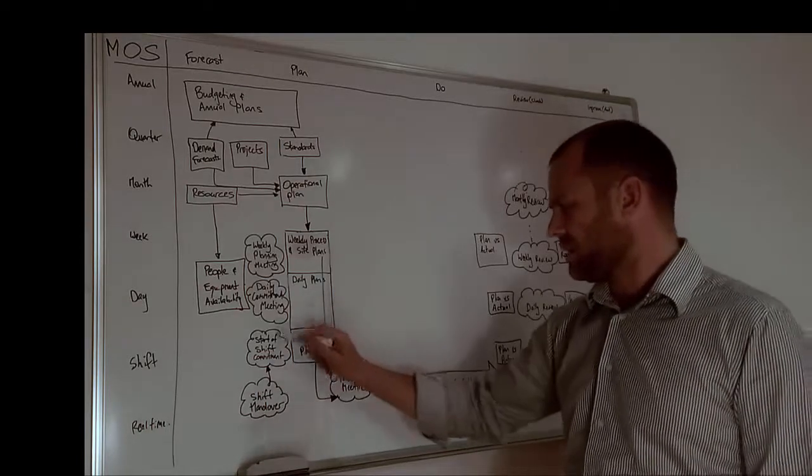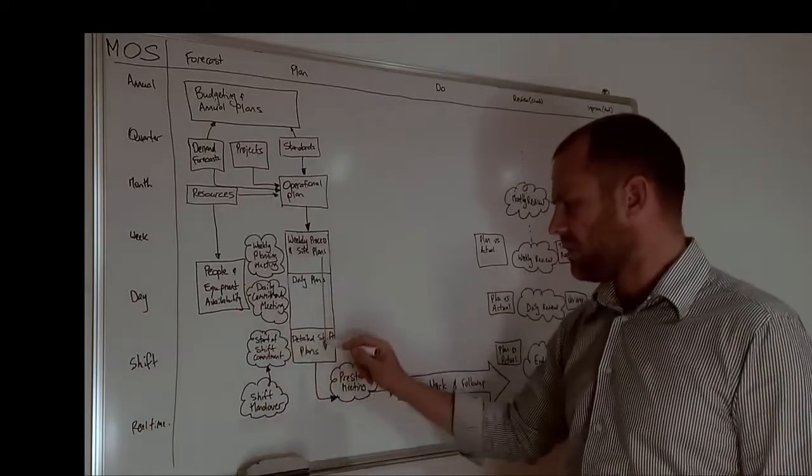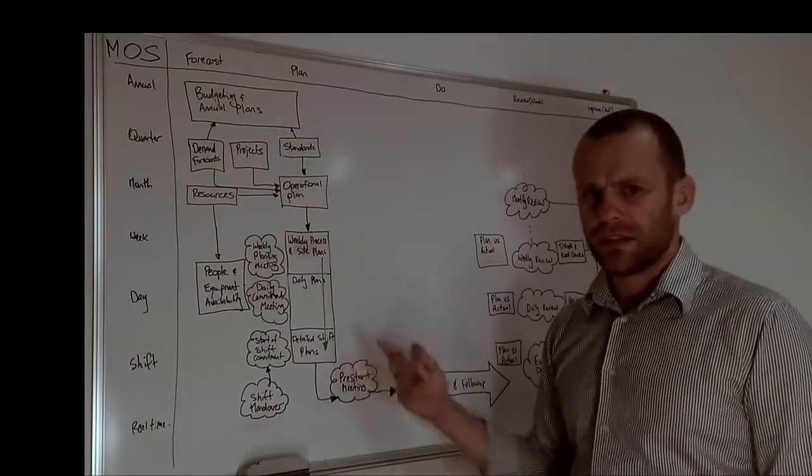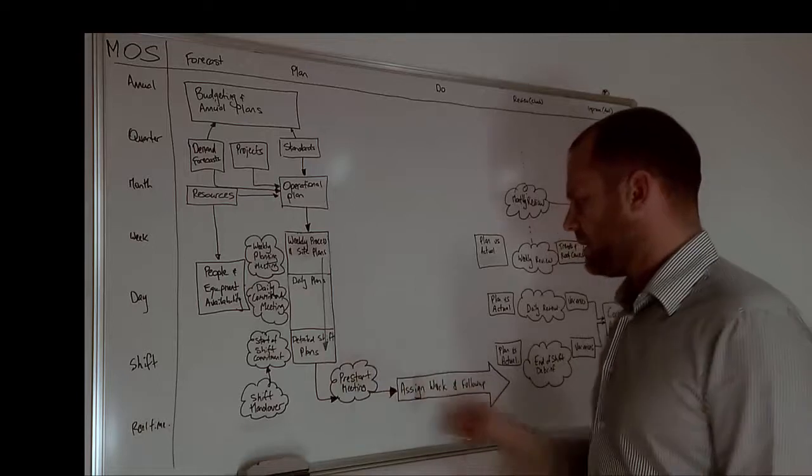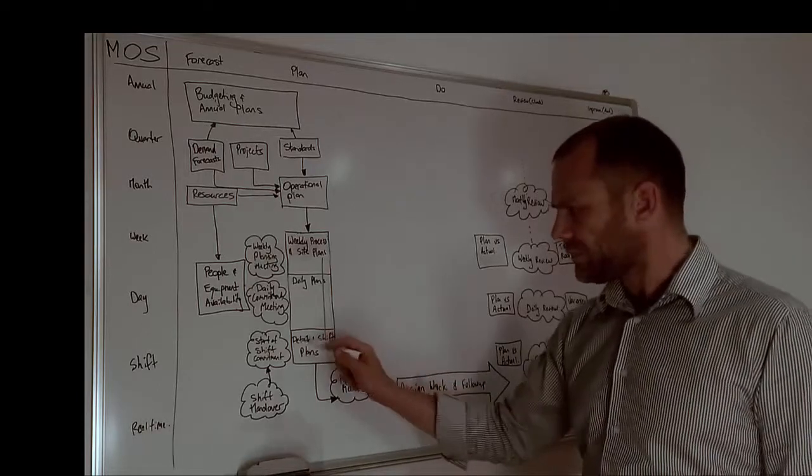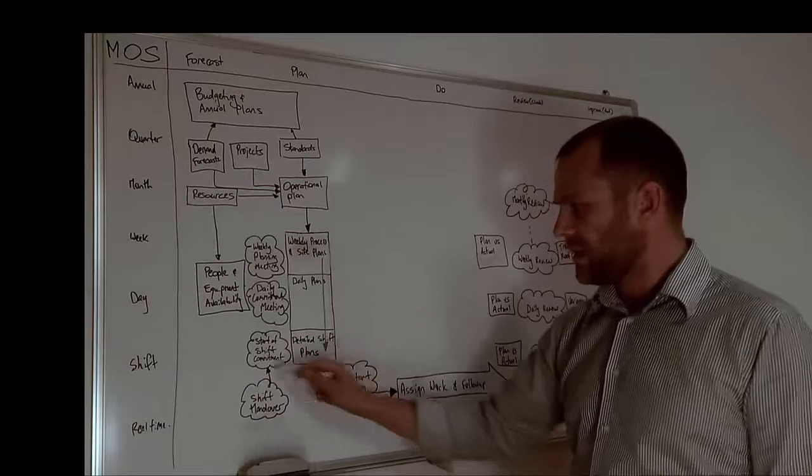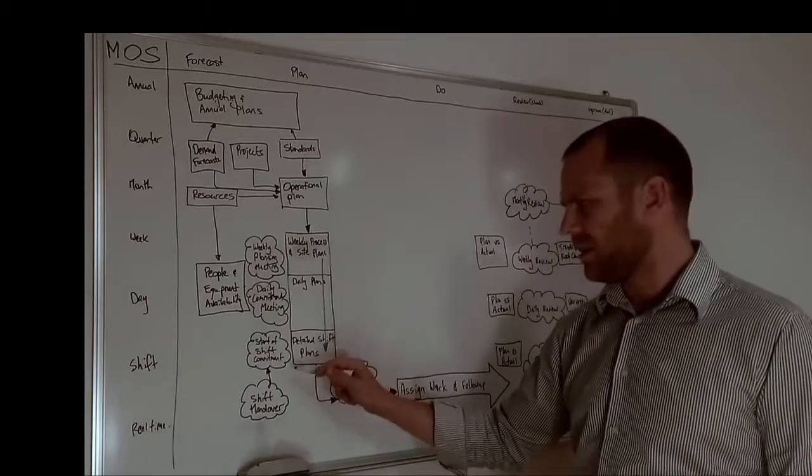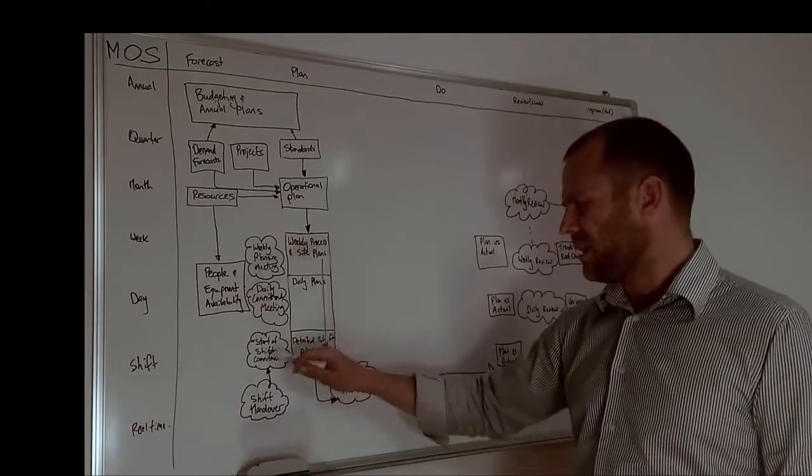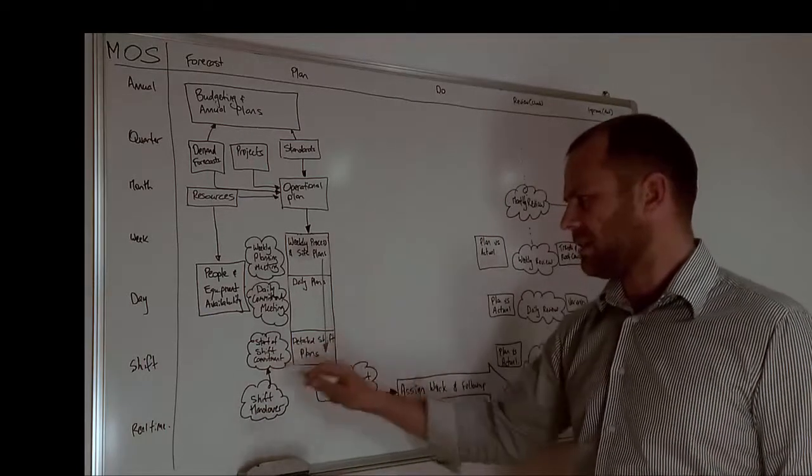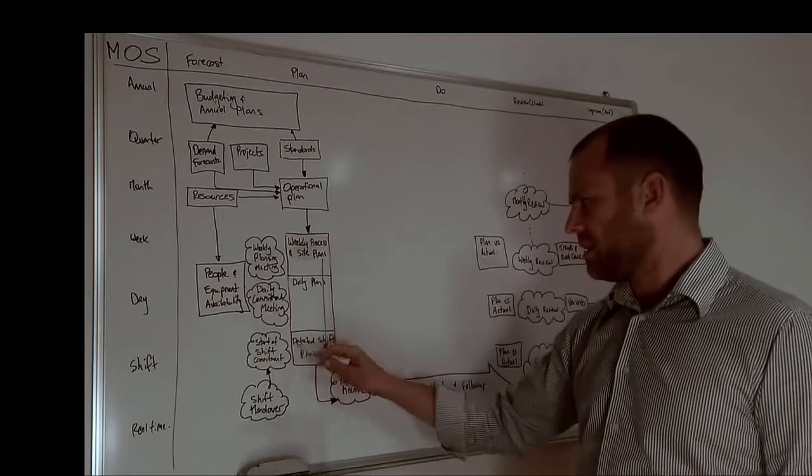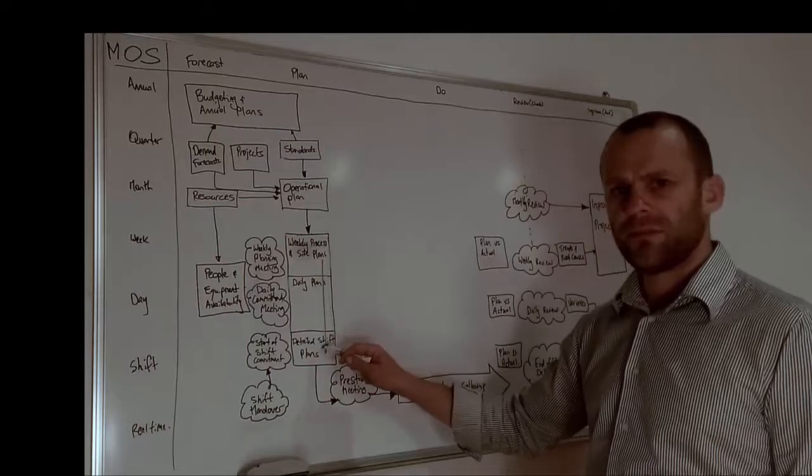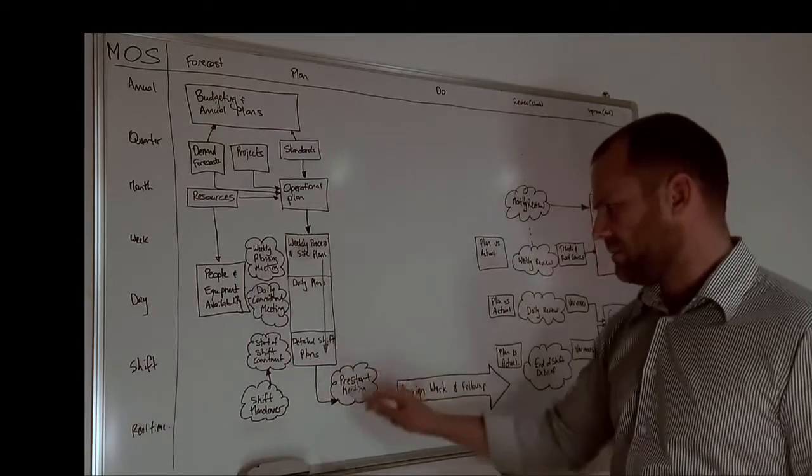And that's all the responsibility of this detailed shift plan down the bottom. It tends to be done by the superintendents and the frontline managers that are responsible for the work in that particular process down here. And there's often a shift handover meeting, which gets us a good dose of reality about what's going on down there at the frontline so that we can adapt the plan and start a shift commitment meeting so that that plan is in good shape and in sufficient detail to be able to brief the crew in the pre-start meeting here.